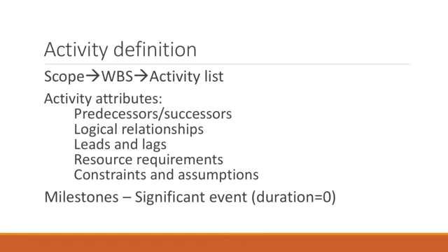When you guys are creating the list of the activities that are going to be needed, the first thing that you guys do is to tabulate those particular activities. The way that you guys tabulate these particular activities is you need to actually give the activity a name, an identifying number, and a brief description that will allow anyone reading this particular document to understand what the activity is going to be about. The next step goes into the attributes.